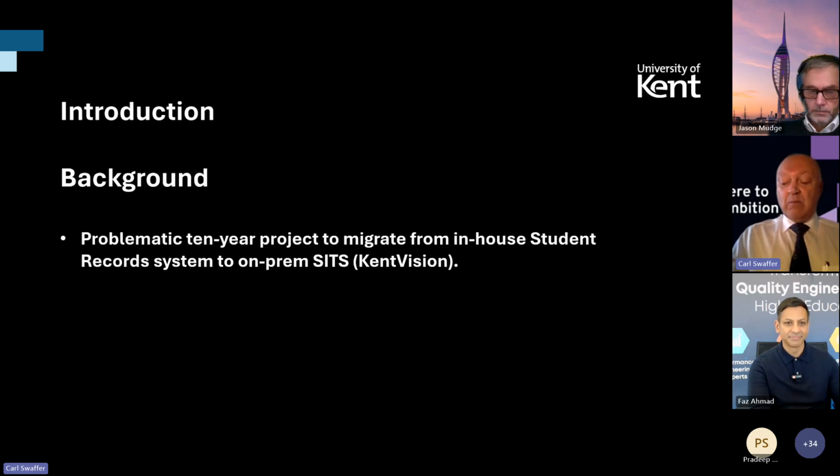In the late 2000s, there was an appetite to move away from our in-house developed student data system, as the technology was fast becoming out of date. A third-party company was engaged to develop a new system, but this unfortunately was a failure in every sense, resulting in the partnership being dissolved early in the project. As a result, when engaging with Tribal in 2011, there was a more cautious approach with initial development of the admissions and clearing system only. It was only after the success of that project that the university took the decision to commit the whole student lifecycle to SITS in 2014.